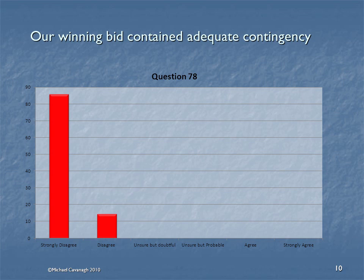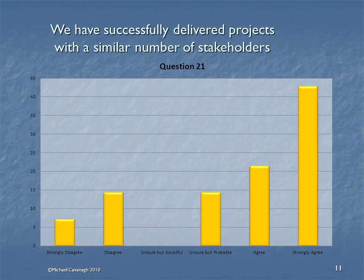There are also going to be areas that need to be fixed immediately. In this particular case, if the bid didn't contain adequate contingency, then we need to do something about that, and there is a strong consensus that we need to act. Most significantly, we need to look at areas where there is a lack of consensus — where people across the team and across the stakeholder population have very different views of whether we are capable of doing this or what our experience level is.